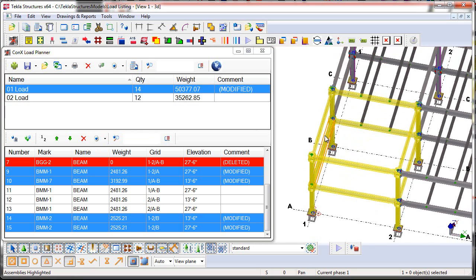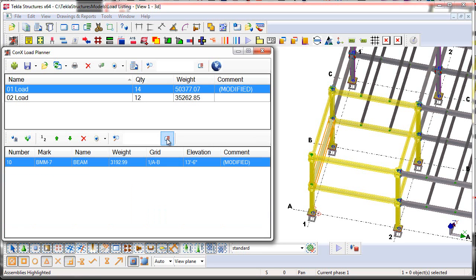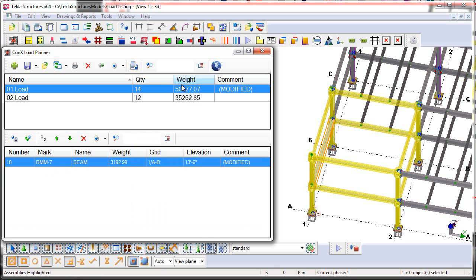So we're going to go ahead and select on that assembly here in the model, and then I can just choose this Filter by Selection. I then can see here that potentially the piece mark has changed or the weight here has changed, and so that may have reduced weight or added weight, and I just want to make sure I verify that here with my load listing.